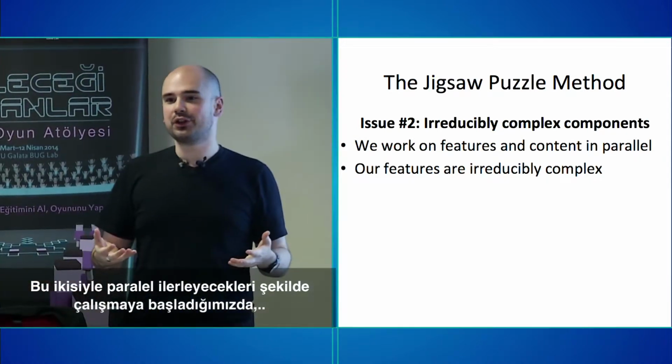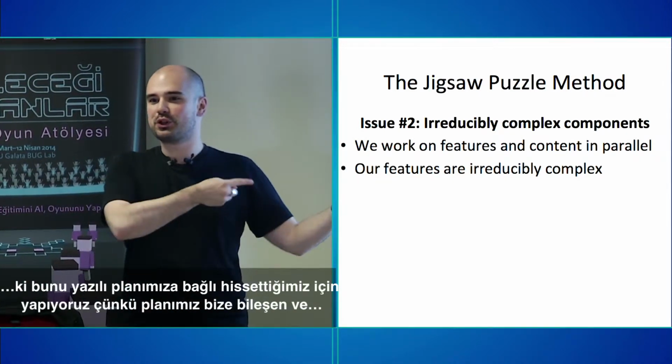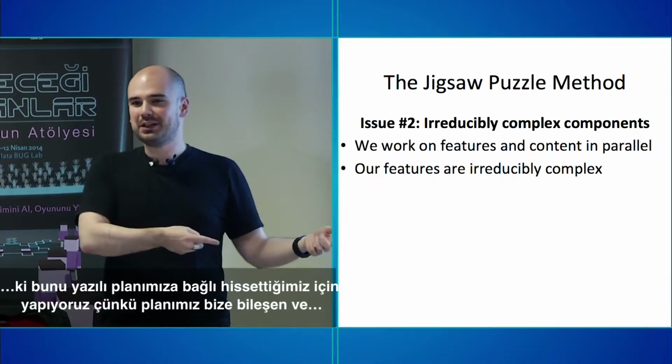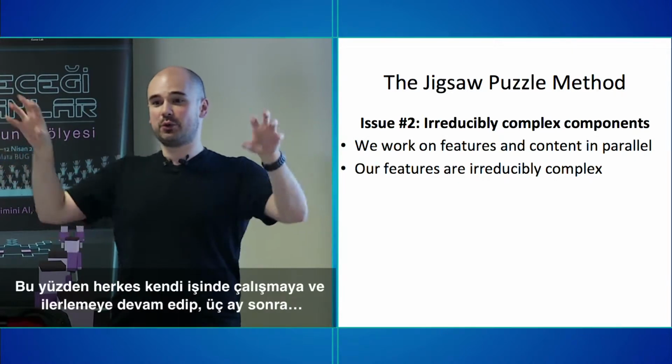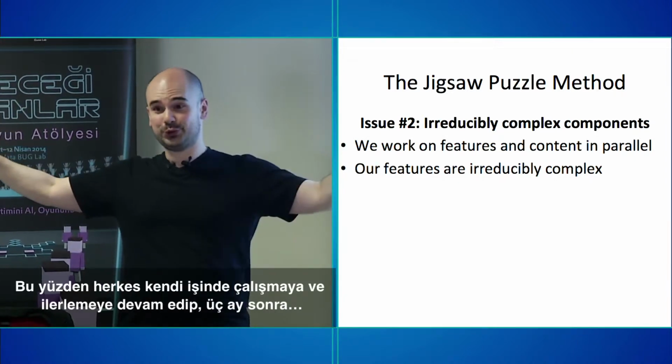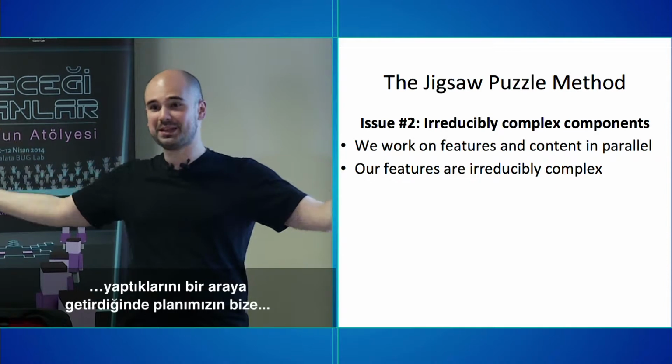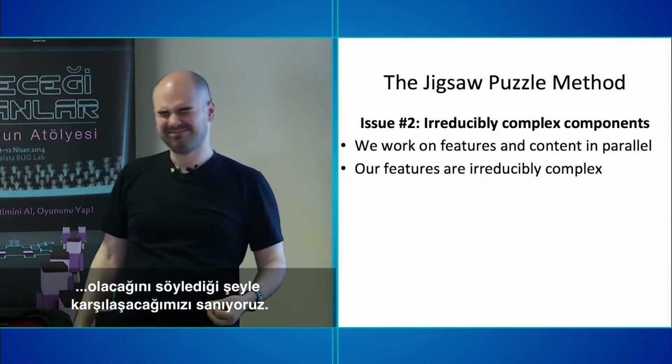Now the reason we're working on these two in parallel is, again, because we're depending on our written documentation. The written documentation says what we could expect from the features and the content. So everyone is just saying, okay, I'll do my stuff, you do your stuff. And then 3 months from now, we meet up and put them together and see if they work.